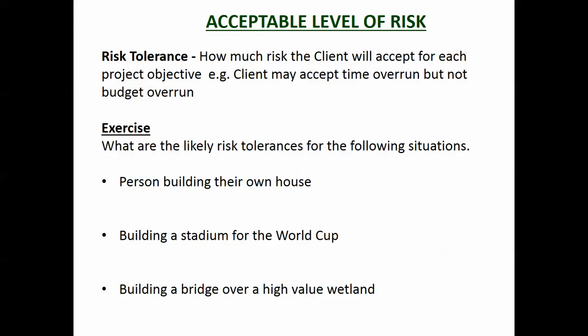So it would mean that you might spend more time putting in protection measures. You might do construction methodologies that take more time and cost more by building everything at a remote site, then trucking it in and just dropping the bridge into site rather than building it above the wetland. So those are the sort of decisions that affect how you plan the project, because you've sort of got to look at the risks and what is important to you and what's not important to you.